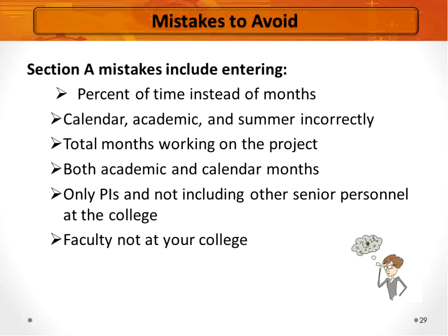Part of this is because it was recognized when the ATE program was first developed that the teaching load for community college faculty is much, much higher than it is for most individuals at 4-year institutions. So you do have the ability with the ATE solicitation to request release time during the academic year, and that's perfectly acceptable. It just has to be very, very clearly justified in the budget justification why you need that amount of time, and that it is release time.